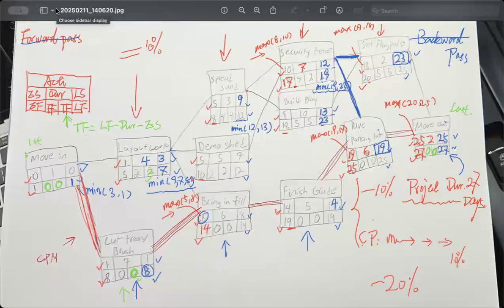So spreading, 12 minus 3 minus 5 is like 4 here. Good. 12 minus 5 minus 5, you're getting 2 here. That's good. 14 minus 8 minus 6, you get a 0 here. That's good. So come to here. 19 minus 7 minus 10, you're getting 2 here. 23 minus 10 minus 8, you get a 5 here. 19 minus 5 minus 14 here, you're getting 0.